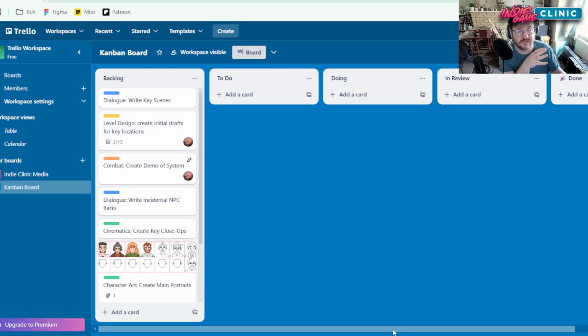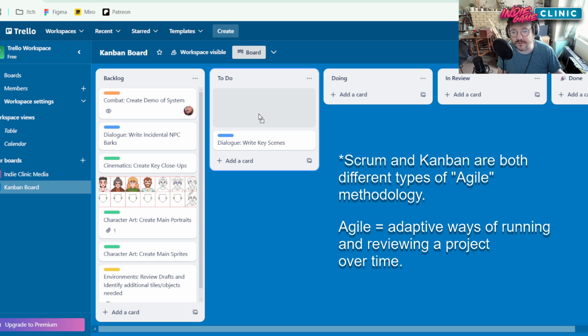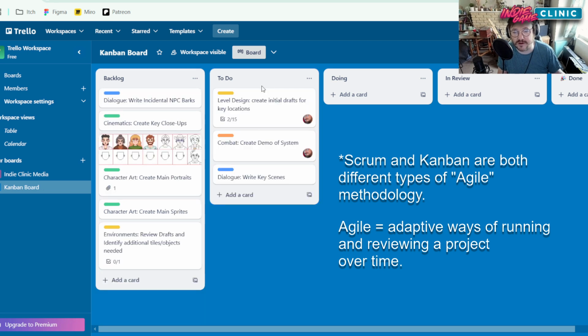And then what this allows you to do is sort of a bit less like Kanban and a little bit more like something we would do in Agile Scrum. And then what you can do is have a meeting every sprint, every week or 2 weeks, and you can take all of the tasks that you currently want to focus on, move them into to do.